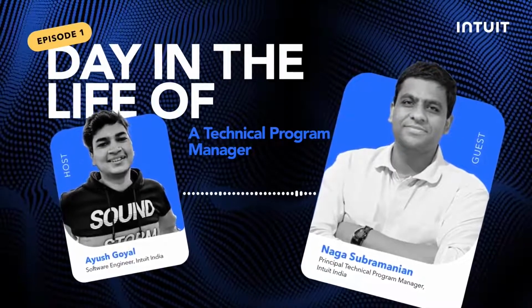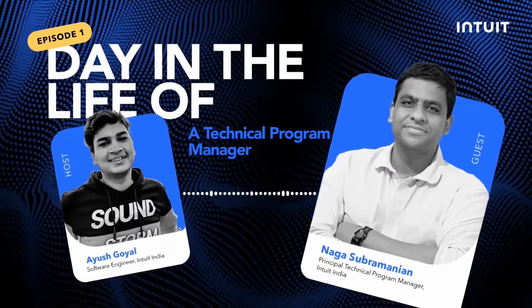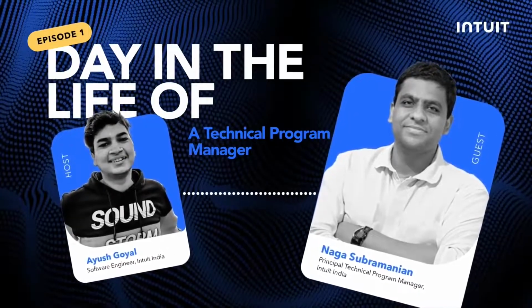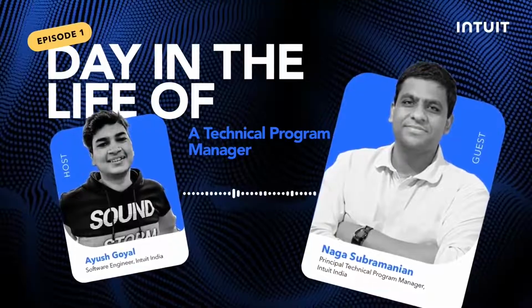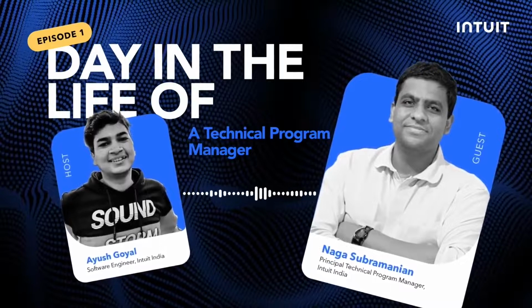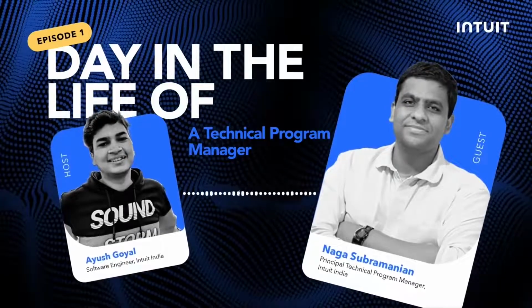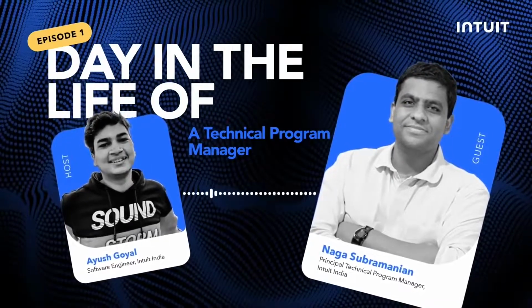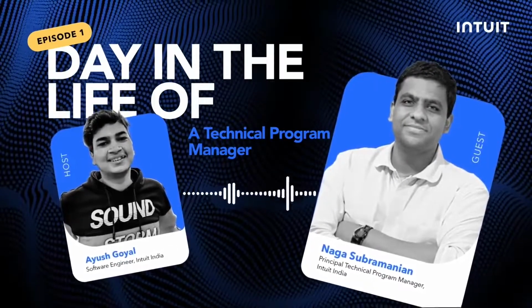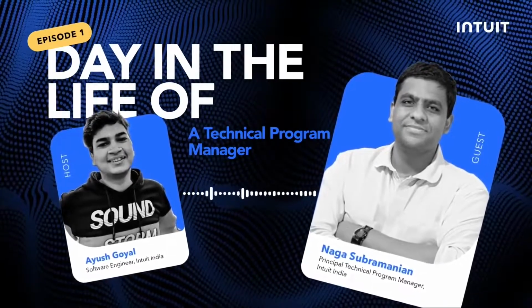Another key skill is being organized and process oriented. This is something very important. While I said everything sits in your brain, I do not trust my own brain, so I have processes for everything. For example, my to-do list, the number of open issues in my program, the risk database. If something comes out of this conversation which I need to work on, it will immediately go to my notebook, which is pen and paper, and before the end of the day, it will go to my to-do list in the system. My to-do list has when it was raised, who raised it, how many days back, what the priority is, whether it is urgent or not, all the details, so that they are all helping me act on the right things. So being organized helps you that way.